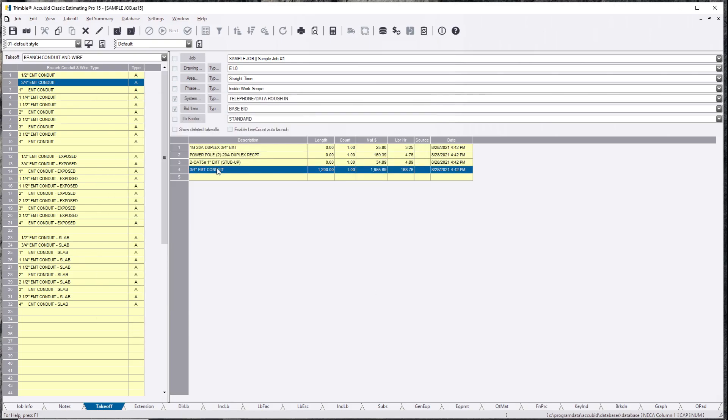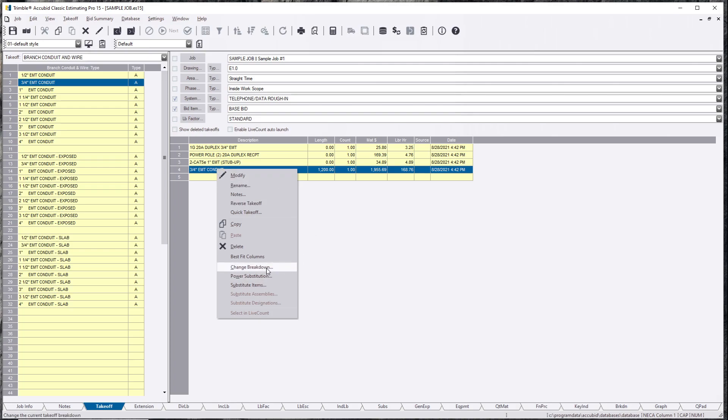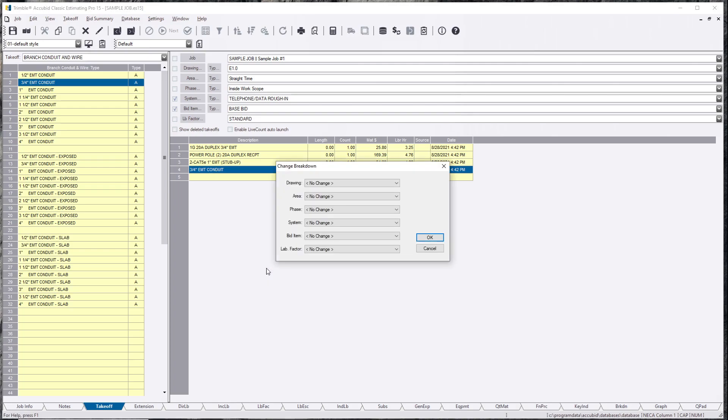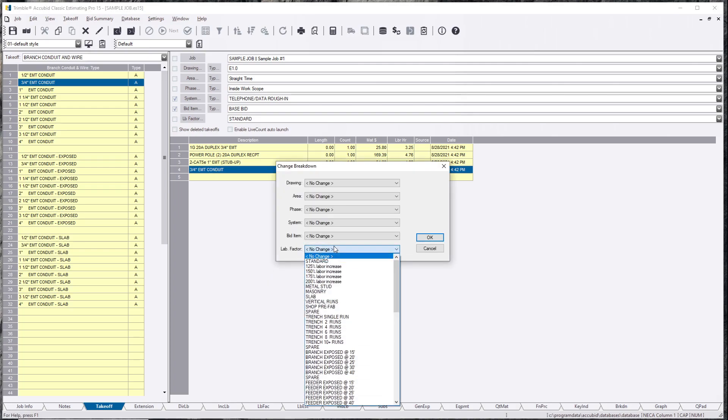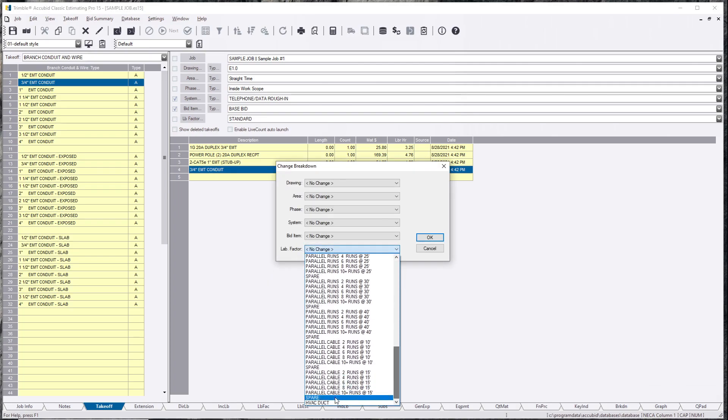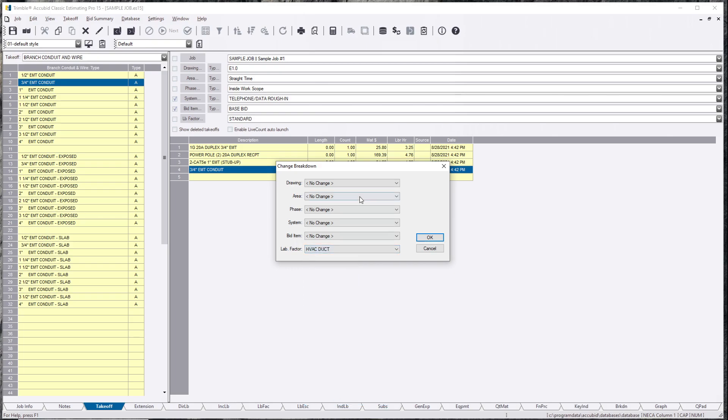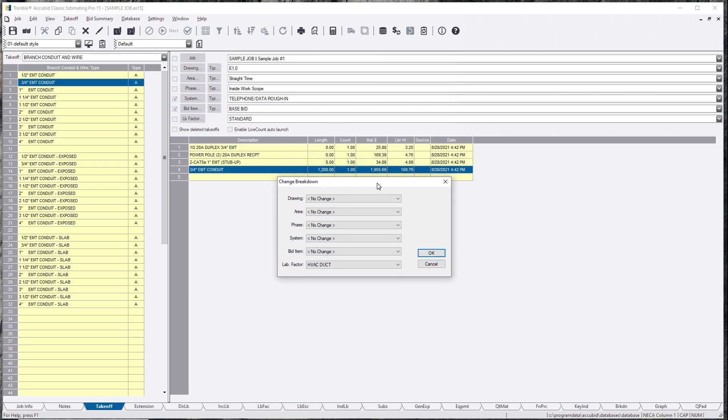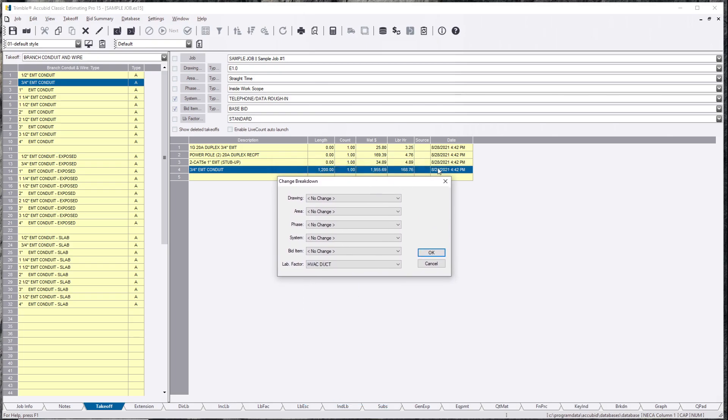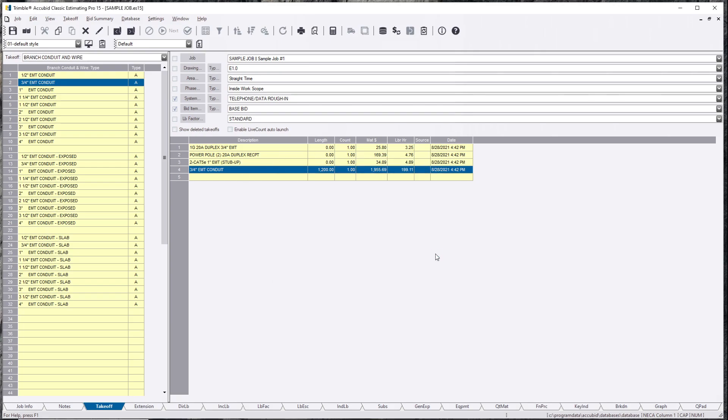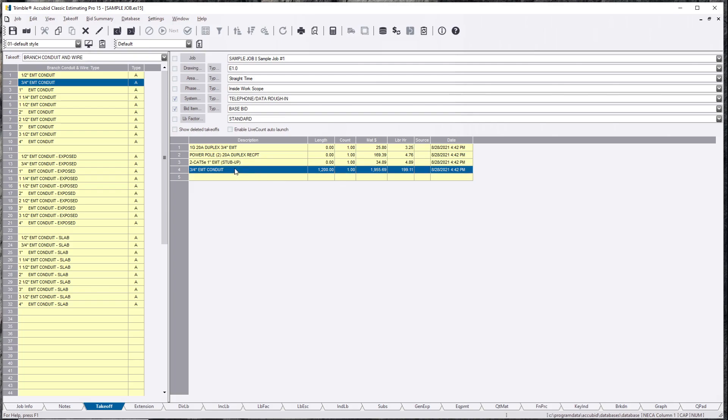So what you want to do is you want to grab this change breakdown and you want to assign it to the HVAC duct. Before I do it, I'm going to drag this over so you can see how it changes. You see it went from 169, I believe, to 199 hours now. So what we did was we impacted this assembly only.